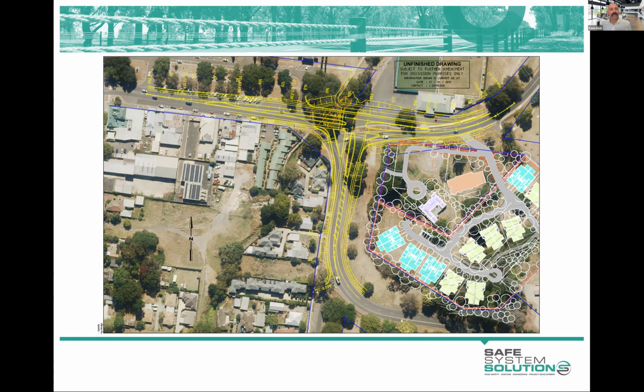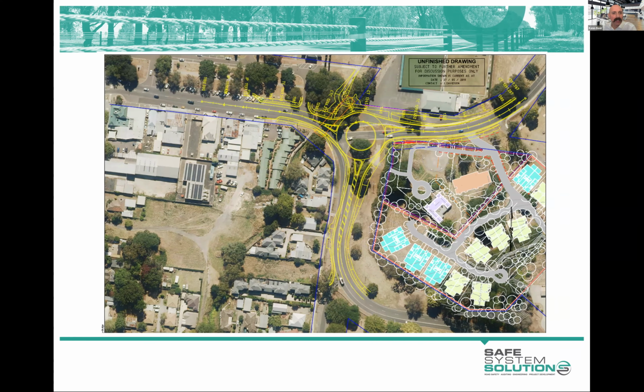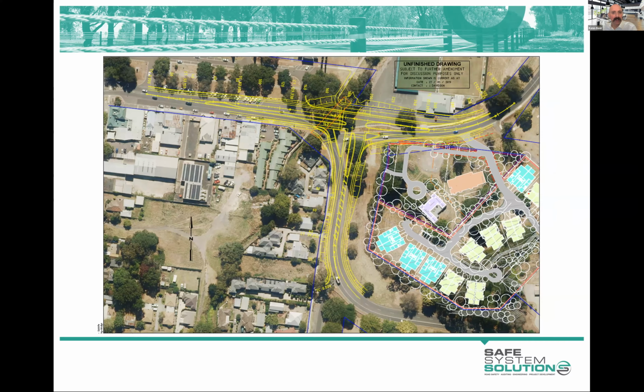So you've got there your three designs, and this is a pretty nice time to be undertaking the assessment, because you've got a little bit of meat on the bone in terms of their ideas, but not so much that they're many thousands of dollars into the design work and the drainage and the pavement plans and everything like that, where they're very reluctant to actually change anything because they're kind of locked into an idea.